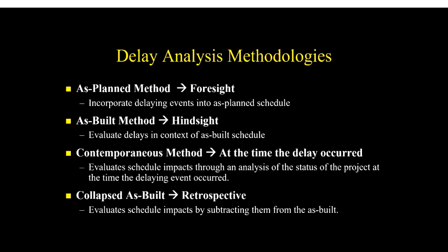First, we have the as-planned methodology, where we basically incorporate delaying events into the as-planned. This technique was developed a long time ago to assess the question of what's the owner's liability for the delays. We're going to take the owner's delays, insert those delays into the as-planned, and then forecast the project completion time.